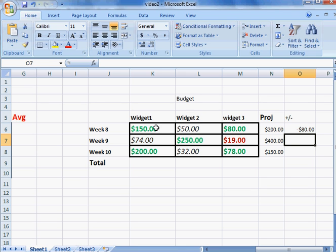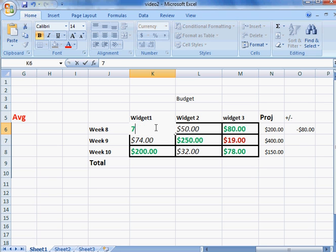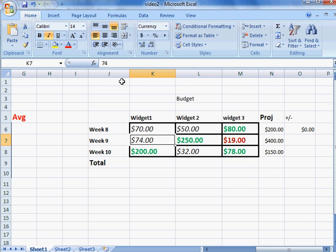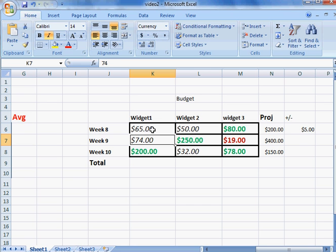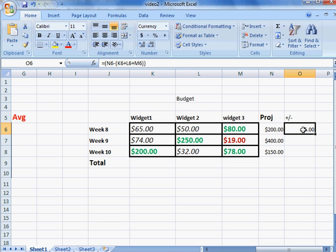Let's say we spent a little less on Widget 1. Let's say we only spent $70 on Widget 1 for the week. Hit enter, and notice how this changed—this is now dead even. Maybe we only spent $65 on Widget 1. Now we're $5 on the positive side. We can actually do conditional formatting on this really quick.